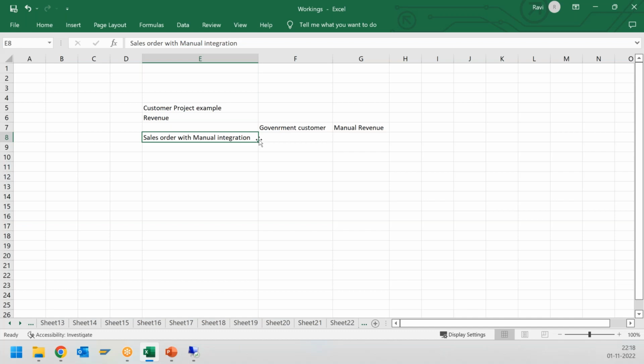Also, if you have seen fabrication companies which provide a fabricated structure, that is also a kind of make to order project. There they will have a sales order. Under the sales order, they can have one item or n number of items, and based on that they will create their project separately and link it with their items.